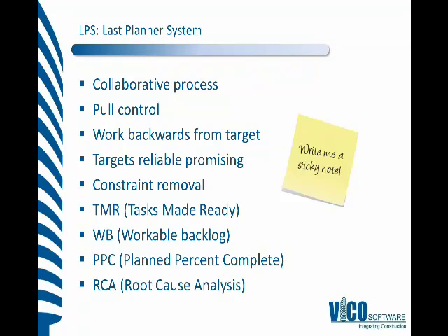Sometimes, obviously, we're not going to plan all of that work in the forecast, in the look-ahead planning or the weekly work planning meetings, and therefore we will have a list of workable backlog. So if we achieve or overachieve our plan, then we will have workable backlog to go back to. The plan % complete metric is a way of helping to ensure that the commitments that are made are more reliable and continue to be made more reliable.